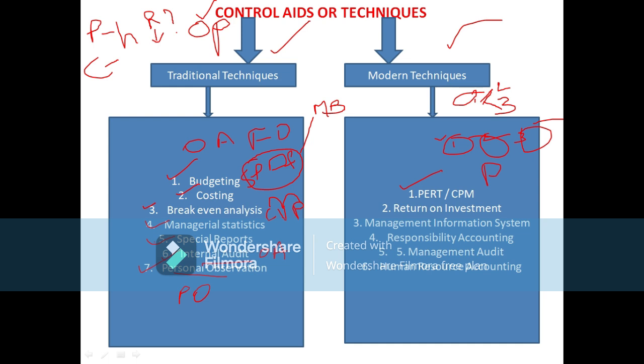A project is completed only when all activities are completed. So activities have precedence and dependence relationships. Precedence: the first activity is known as the precedent activity. The second activity is the dependent one. Precedent and dependence relationships. Based on this, a network is developed showing the sequence, time taken, and the time of start of activities.